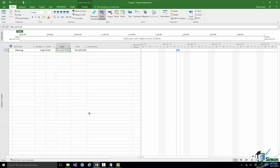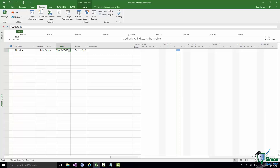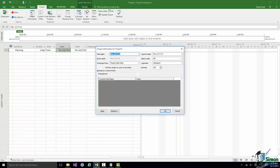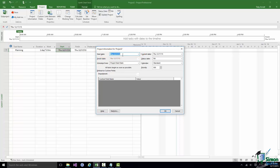By default, new tasks are created either on the Project Start Date or on the current date — in this case both are today. You can check which it's set to in Project Options on the Schedule page, immediately under where you've set New Tasks to Auto Scheduled. To find the Project Start Date, click the Project tab on the Ribbon, go to the Properties group, and click Project Information. That shows the start date — Thursday December 17th, 2015 — and also the current finish date.